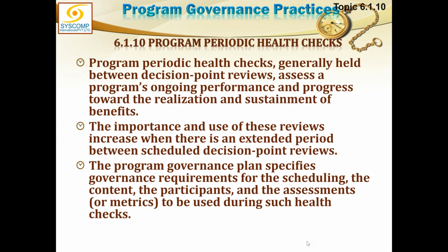Therefore, we need to put in certain decision points and those would be the health checks. The program governance plan specifies governance requirements for scheduling, the content, who are going to be the participants, and assessment metrics to be used during such health checks.